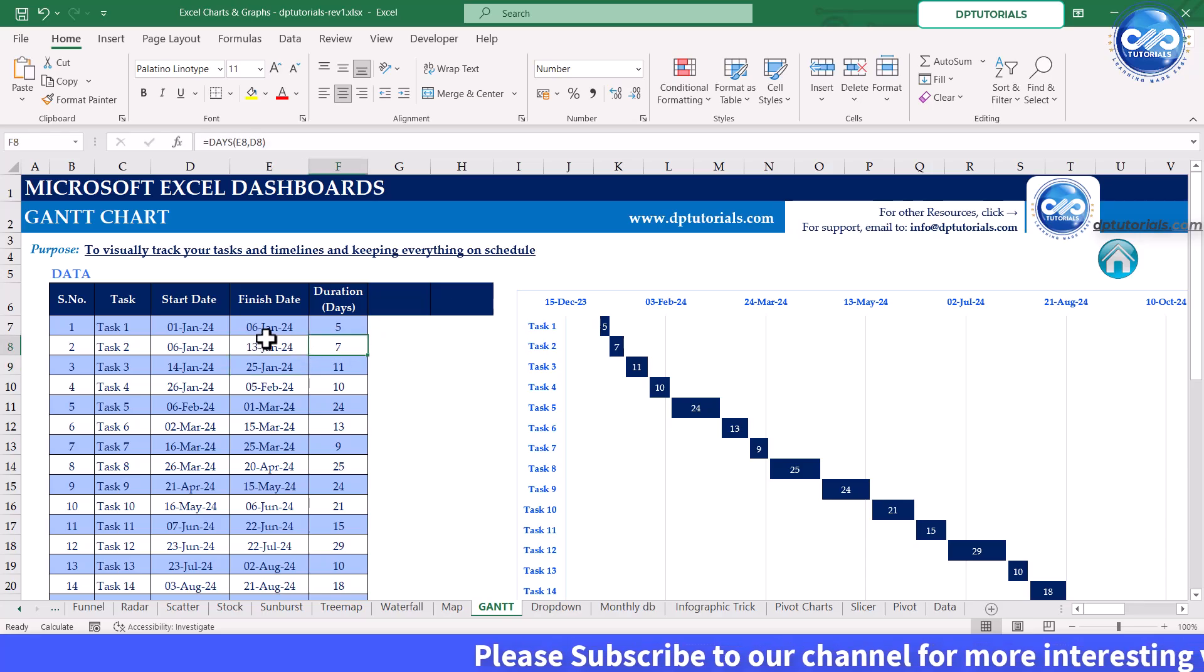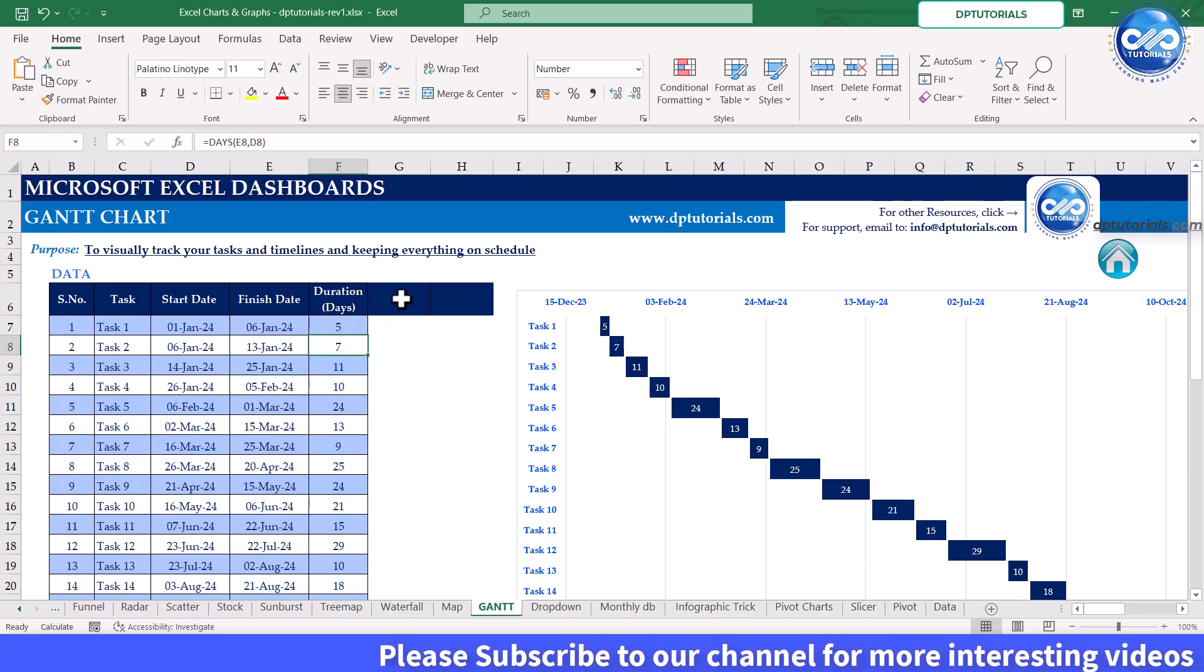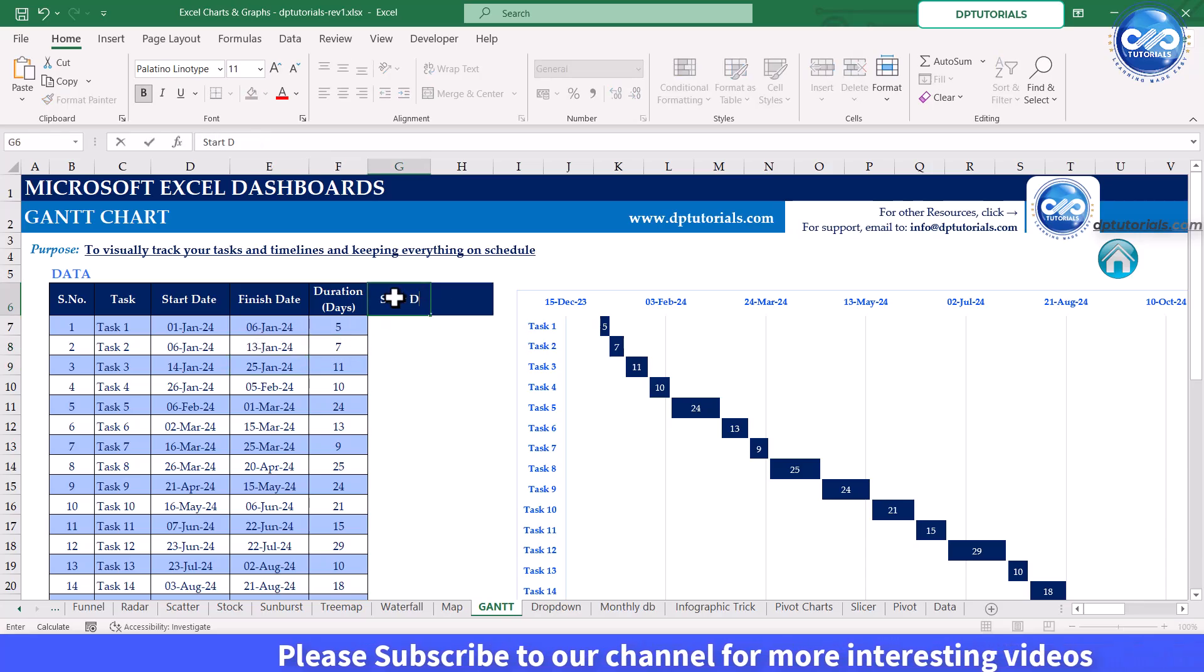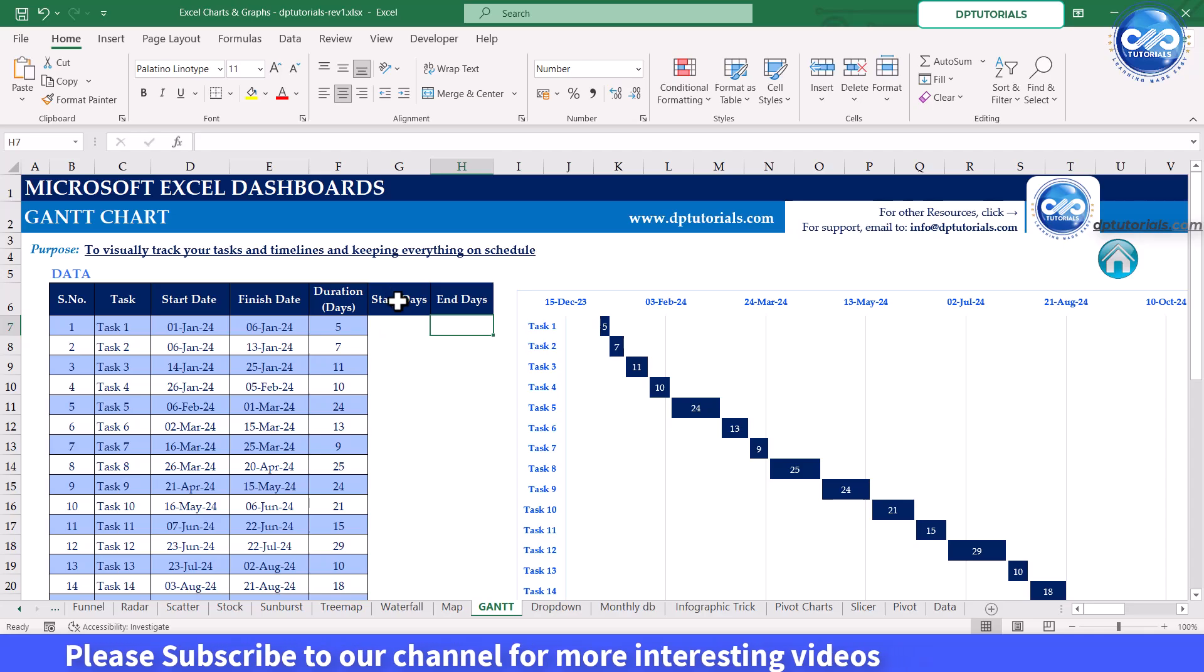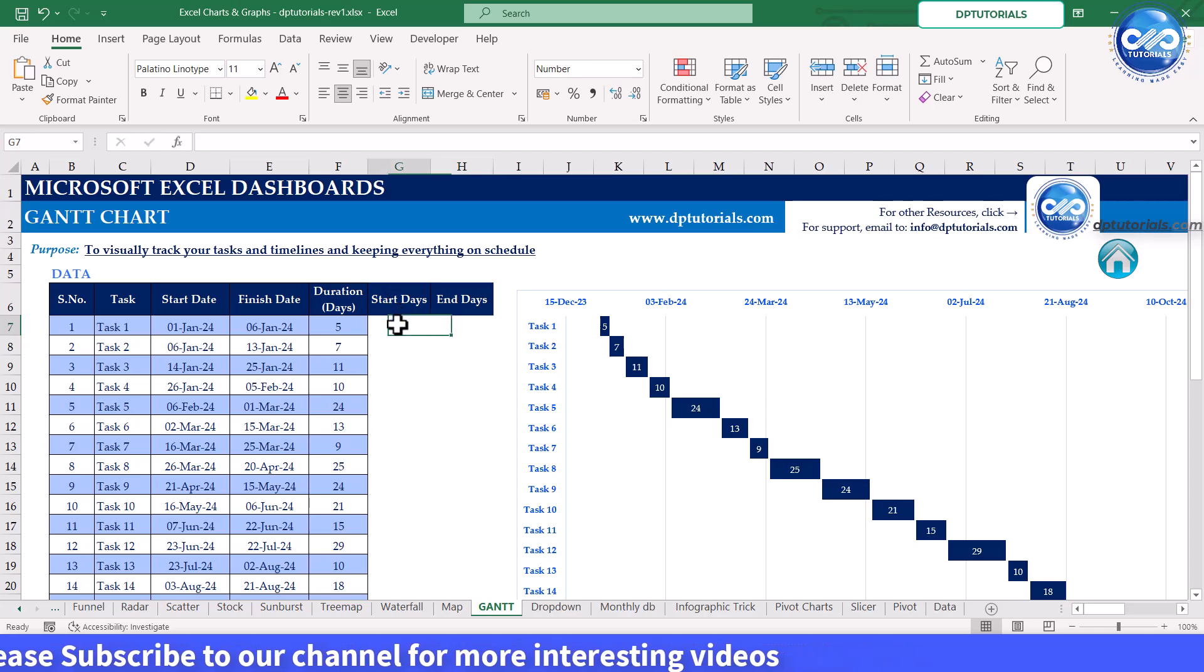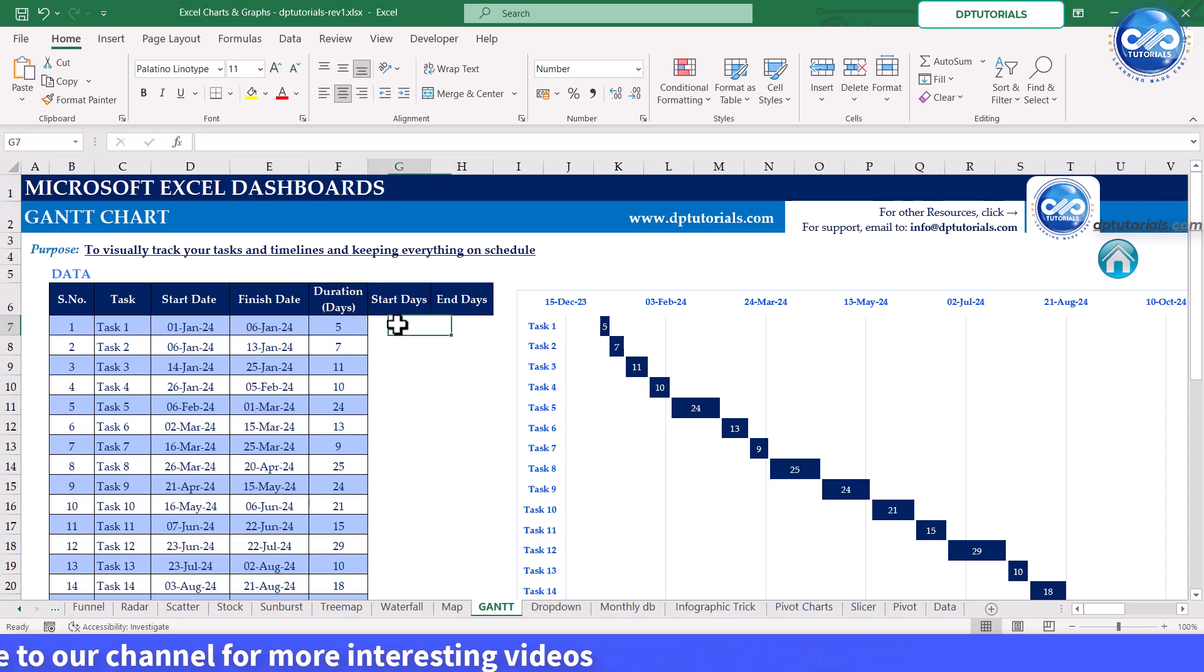Now to create the Gantt chart, insert two new columns: start days and end days. In start days, calculate the number of days from the project start date.